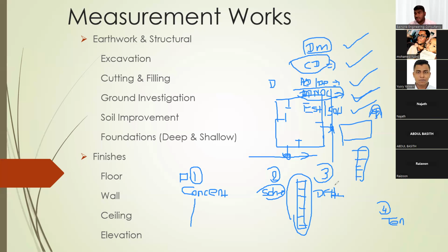Now at this stage, you have all the information from the authorities. Then you update it in your detailed design and your tender document. Then you float the tender. So while you go for a tender, all of your drawings are in compliance with all the authorities I mentioned, 1, 2, 3, 4, 5.